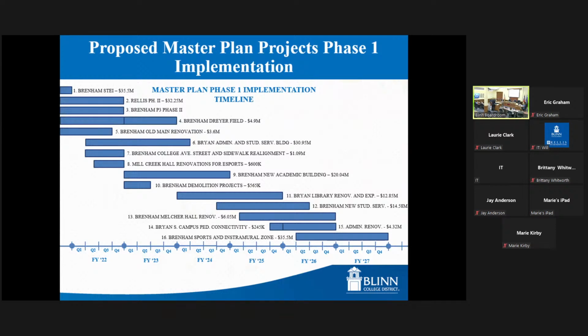It's a bit of a unique project as it's student services. They don't run on the typical time frame. We wouldn't want to try and get them in a new building in August because that's their busy time of year.